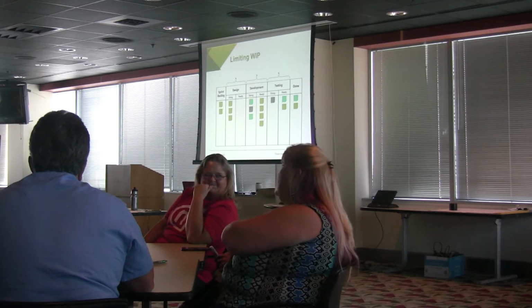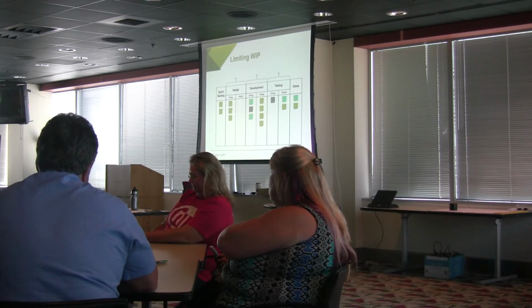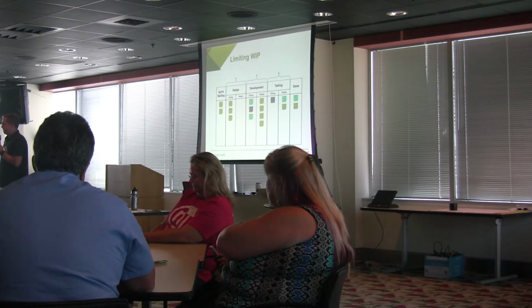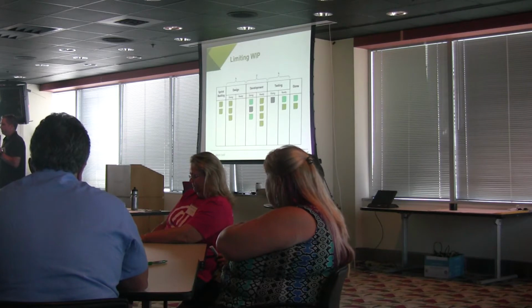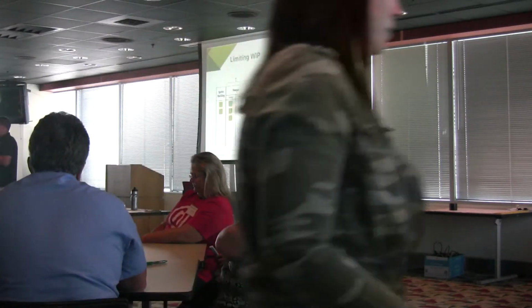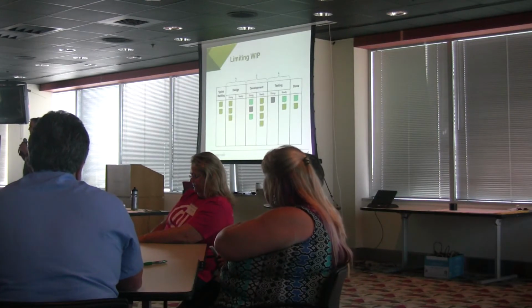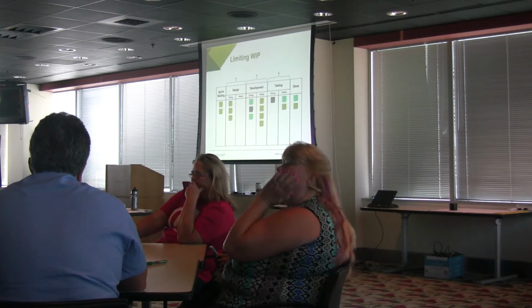Yeah, so if it's a 10-day sprint, and I'm taking 5 of those days off, generally speaking, I think most teams say 6 hours is the average per day. So what is that? 6 times 5, so 120? No, wait, 60? 60 hours? So I have 60 hours available for me if I'm working at capacity, right? Again, there's that 2-hour fudge.